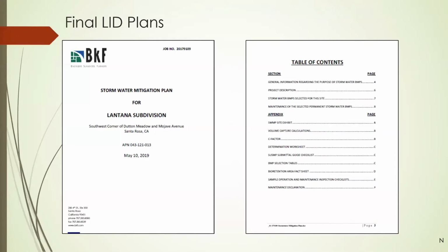The other thing that we're looking at is your... Nick, final, yes. Sorry, this is Flannery with City of Santa Rosa. One thing I'd like to add is a common way for that to happen is when there's AT&T and PG&E and Comcast coordinations, when the junction structures come in based on the consultant's design plans. So that's something that consultants need to be really careful of, and the contractors, is that coordination touch point from the private utility relocations, because the utility boxes can really wreak havoc on that situation Nick was referring to. A really good point.